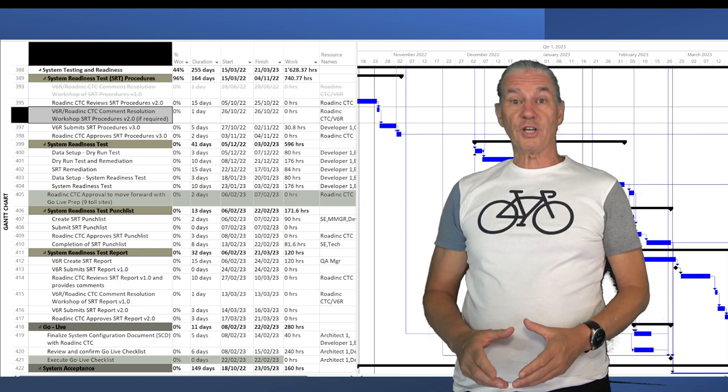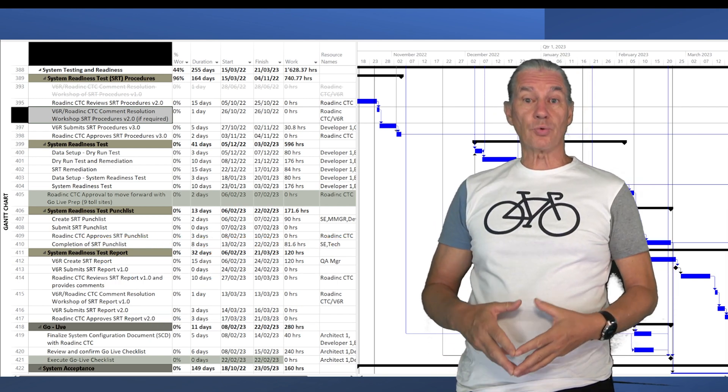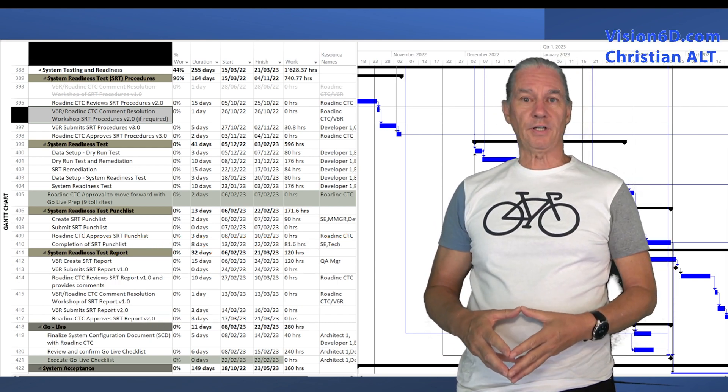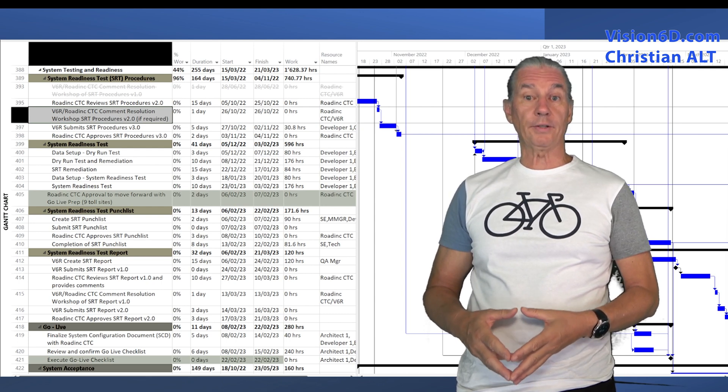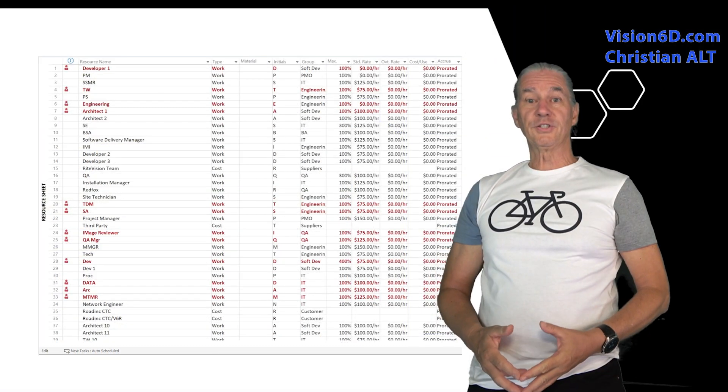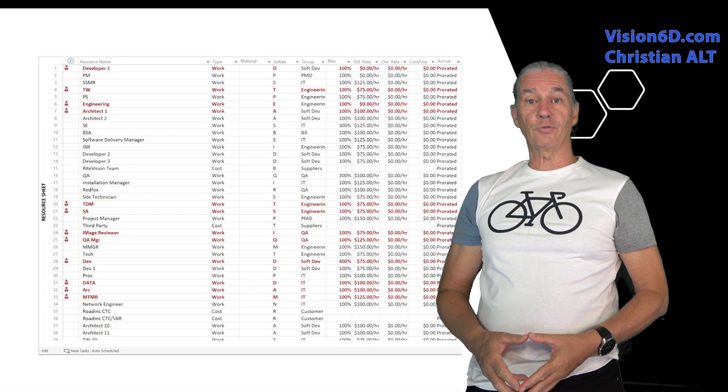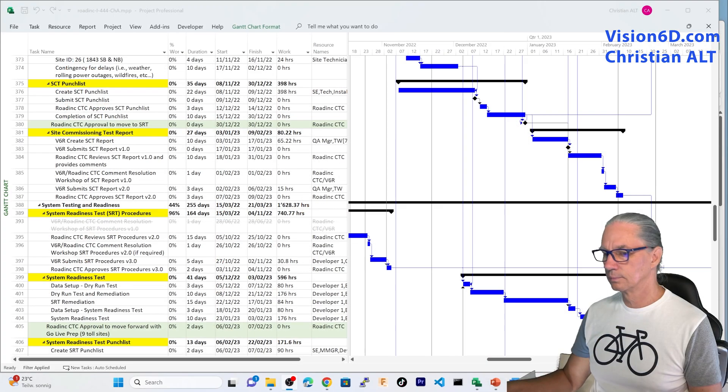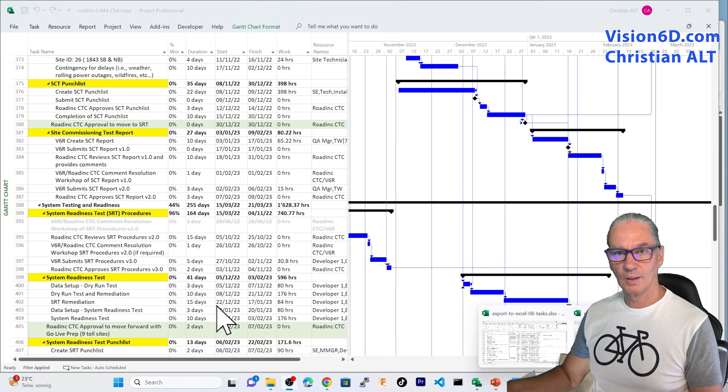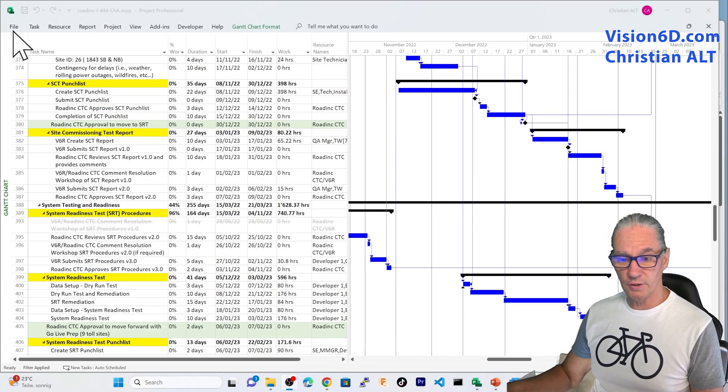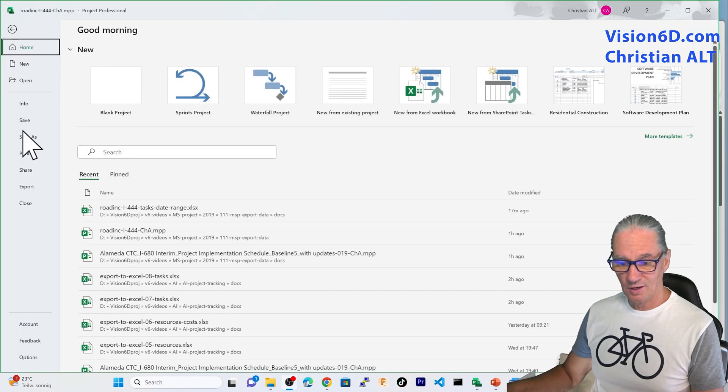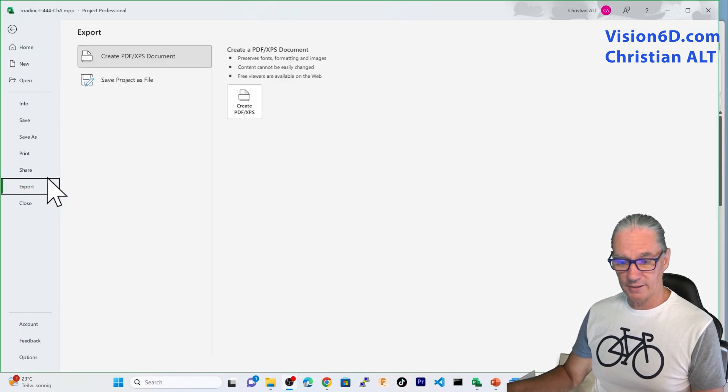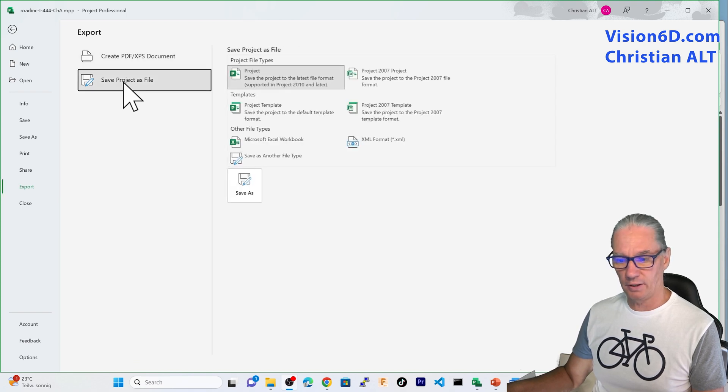The project that is behind me is relatively complex and contains quite a lot of tasks. It contains about 50 resources. Exporting data is really simple. For that, I go into File. From there, I choose Export and here, I will choose to save project as a file.